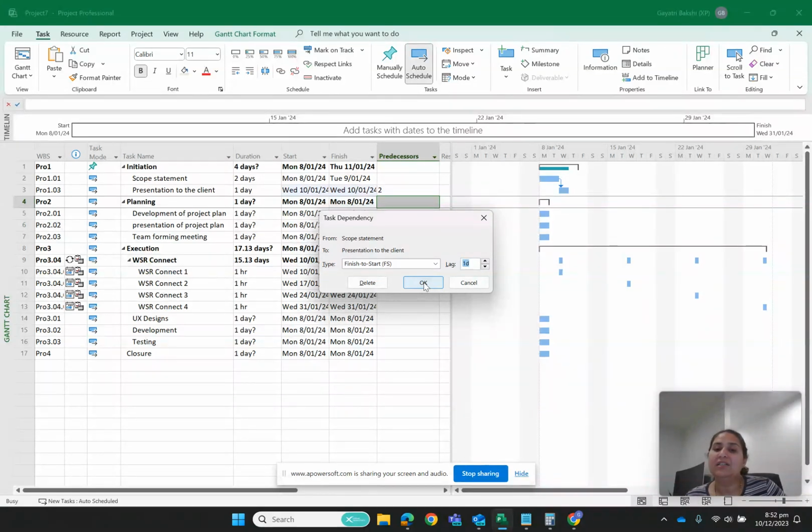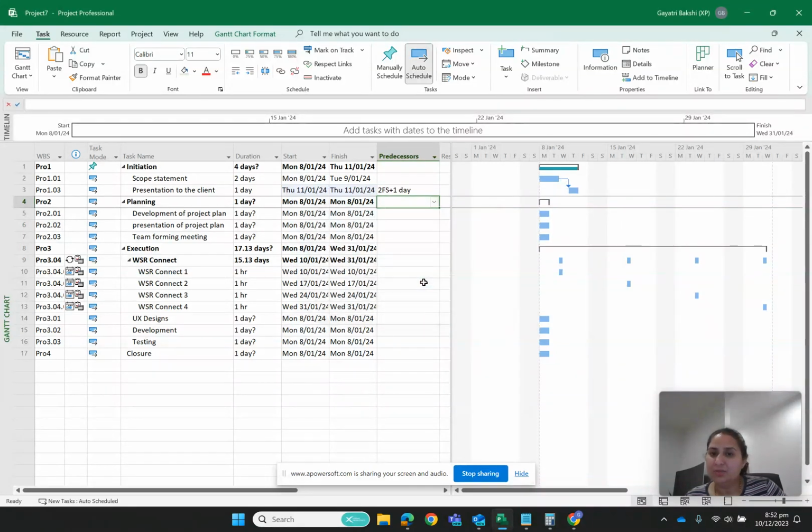Rather, I'm going to take a day, and then give this presentation to the client after finishing my scope statement. So this is how it is defined: Monday, 2 days for this and 1 day for this, with a lag of 1 day.